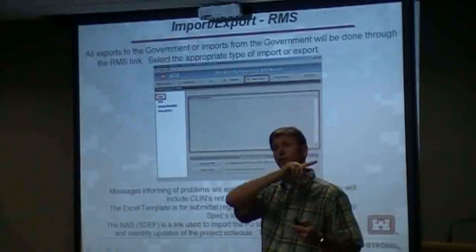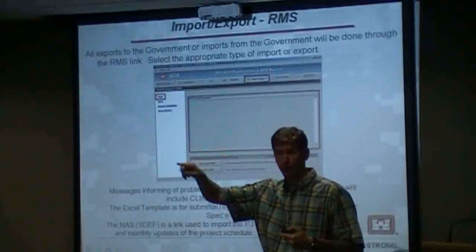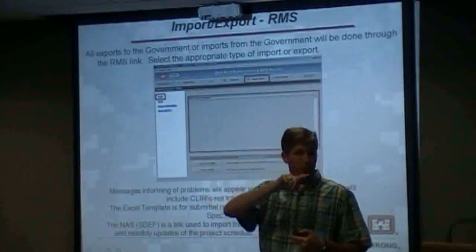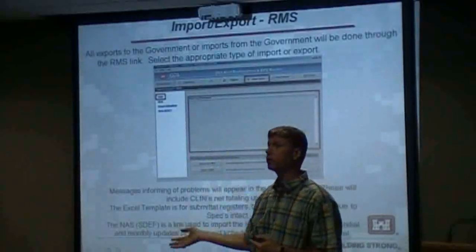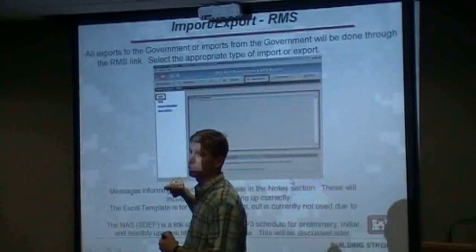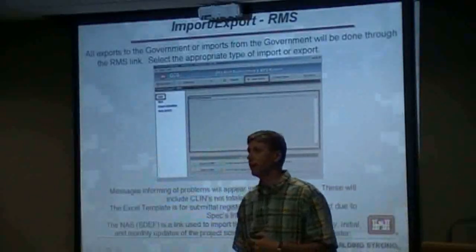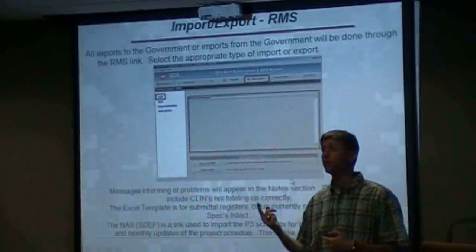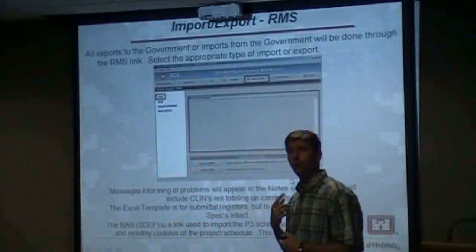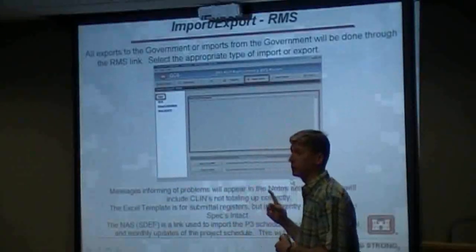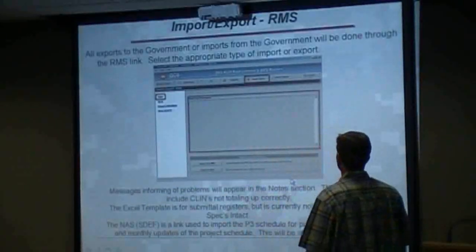If the system tells you your CLINs are unbalanced, that means your schedule does not match the dollars assigned to your bidding schedule. When you turned in your bid, CLIN 0001 was equal to a certain value, 0002 equal to another. If your schedule doesn't match that, it will tell you your CLINs are unbalanced and it will not export pay activities or schedule information to the government.